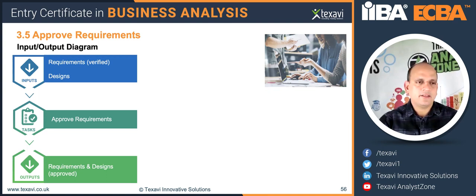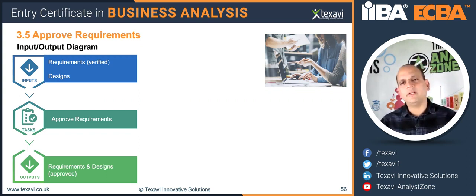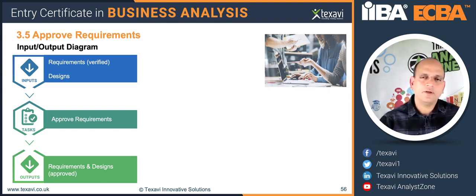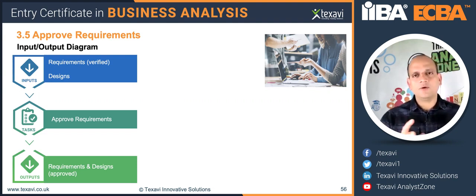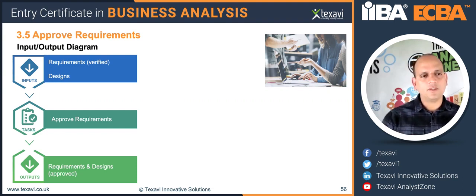The approved requirements, as it says, are all flowing logically, aren't they? You need to maintain the traceability of the requirements, so you've got the first one, tracing requirements. Then you need requirements management or maintenance, which is an overall set of activities that you do all the way through. Then assessment of the requirement change, then you prioritize the requirement, and you've got to approve the requirement. If there are any changes, you need to approve or take a decision on that. They're all interrelated, aren't they? So I would like to bring that kind of cohesion into this knowledge area.